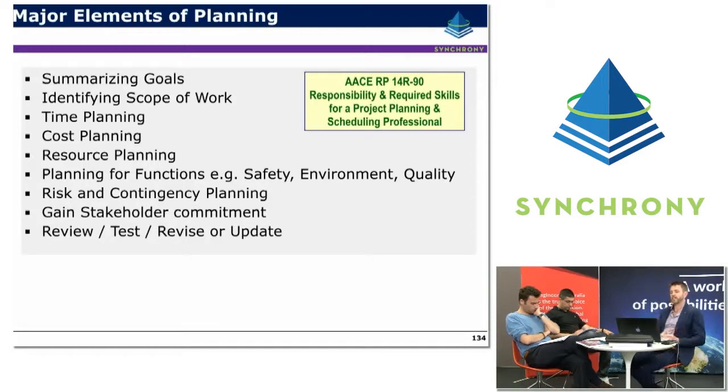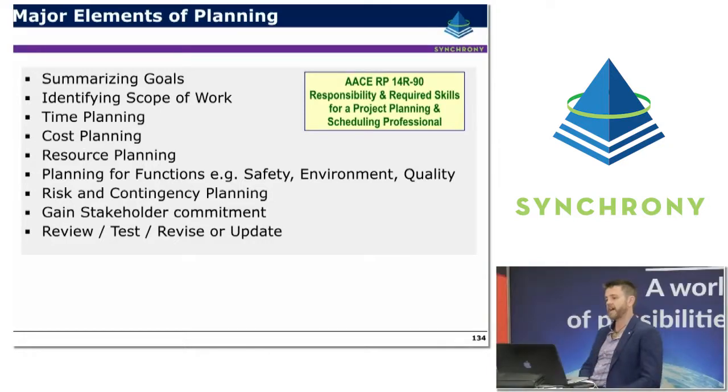So there's an AACE recommended practice on the major elements of planning. It's AACE RP 14R-90, Responsibility and Required Skills of a Project Planning and Scheduling Professional. It's a really handy one to read because it provides all of those aspects of planning and scheduling skills that feed into the EVM process as well.